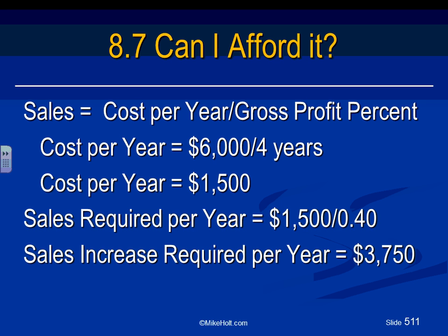If your profit is 10%, then you divide by 10%. If your profit is 5%, you divide by 5%. We're using a 40% profit. So you need to increase your sales of jobs a year by $3,750 in order to justify a $6,000 software.